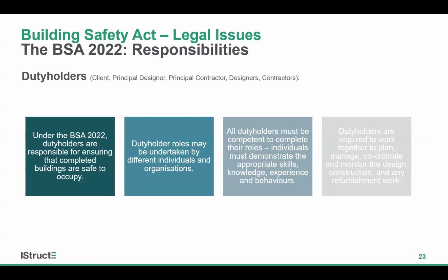It's important to note that the duty holder roles can be assigned or applied automatically. So structural engineers should take care to understand what is being expected of them under the terms of any appointment, and to ensure this is clarified at the outset of any project. It would be prudent to ask and understand which other relevant parties are involved, and what roles each of those parties are taking on. I've seen this referred to as a design matrix.